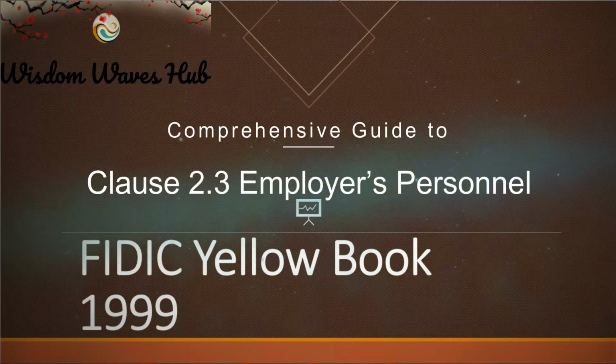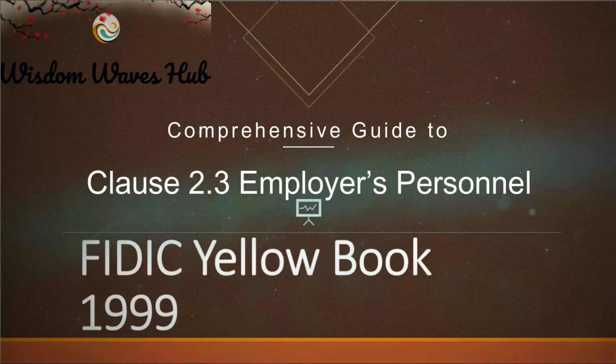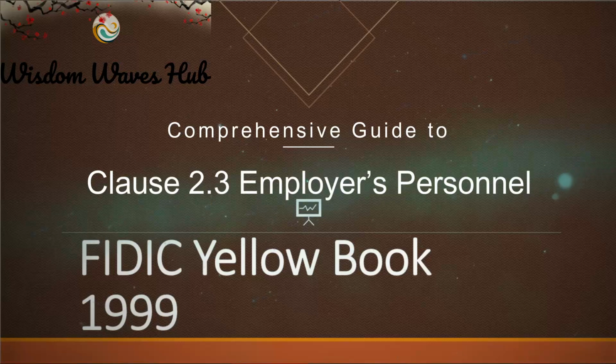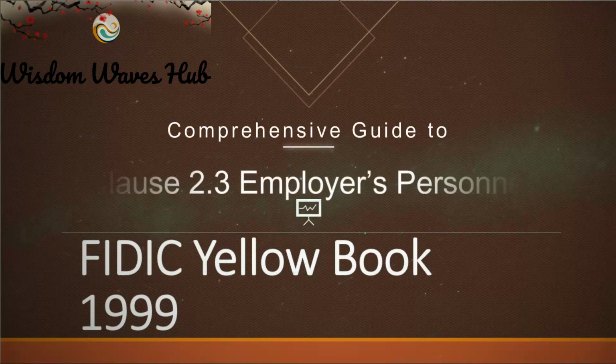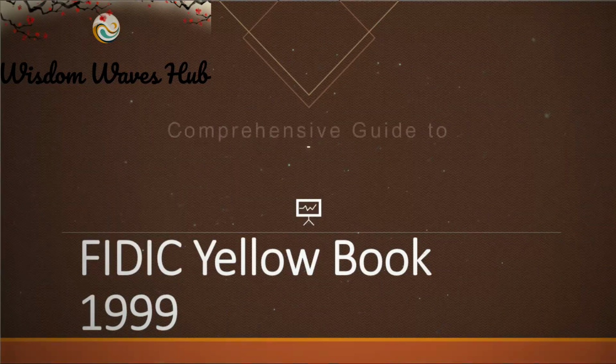Broad international usage and context. The employer's duties are vast, from granting site access to making payment arrangements. One notable provision is subclause 2.4, which ensures the contractor's payment security. It mandates the employer to provide evidence of financial arrangements, ensuring the contractor's confidence in consistent payments.